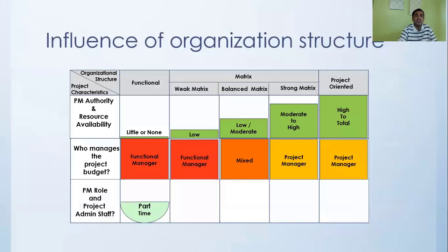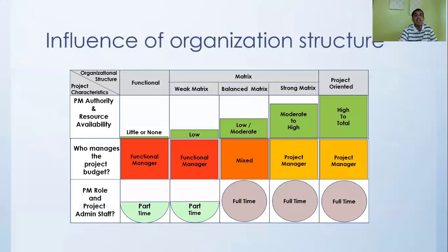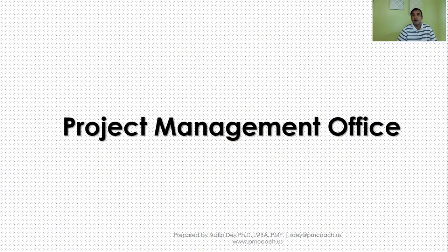The project manager role is really part-time in functional and weak matrix, and full-time in projectized and strong matrix, and full-time for the balanced matrix. In terms of admin staff, you'll find that it is part-time in case of the balanced matrix.